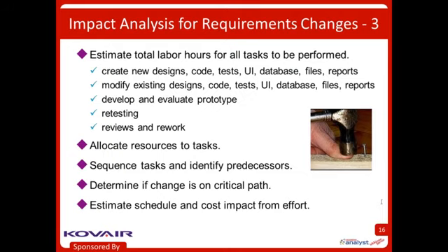Now, you might say, well, this is a lot of work. That's silly. Well, for many kinds of changes, maybe it is unnecessary. But I've actually spoken to clients of mine who told me some horror stories about change requests that were not analyzed for their impact. It turned out to be vastly larger than imagined, such that if they had done the impact analysis, the customer would have said, oh, okay, well, if it's going to cost that much and take that long, let's not do it. But they didn't learn that until they were already way into it, and so they threw away a lot of effort, and that's a pretty expensive way to run a project or an organization.